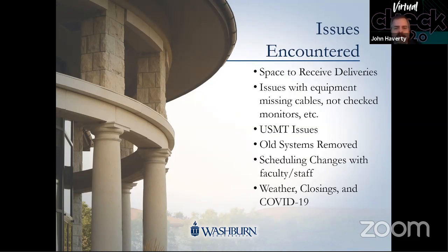As I mentioned earlier, the old systems that were removed, that was an ongoing issue, finding space for them. Probably the biggest thing that we had during the whole issue, and I alluded to it in the last bullet point there, is weather. I can think of at least 2 times that we had large installations planned weeks ahead. And of course, we come up to those events or those dates and the university's closed because of snow or ice or whatever it was.